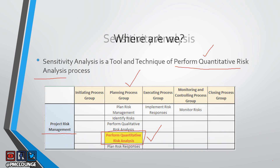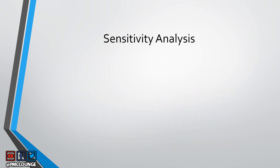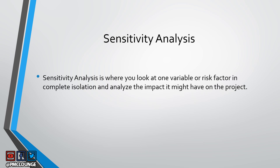Let's define sensitivity analysis. This is where you look at one variable, or just one risk factor, in complete isolation. For your project, you have a list of risks — a list of risk factors that might impact your project. When doing sensitivity analysis, you look at only one risk factor or variable in total isolation. That means you consider just one risk and assume the rest of the project will go as per plan, then analyze the impact of this one risk factor on your project.